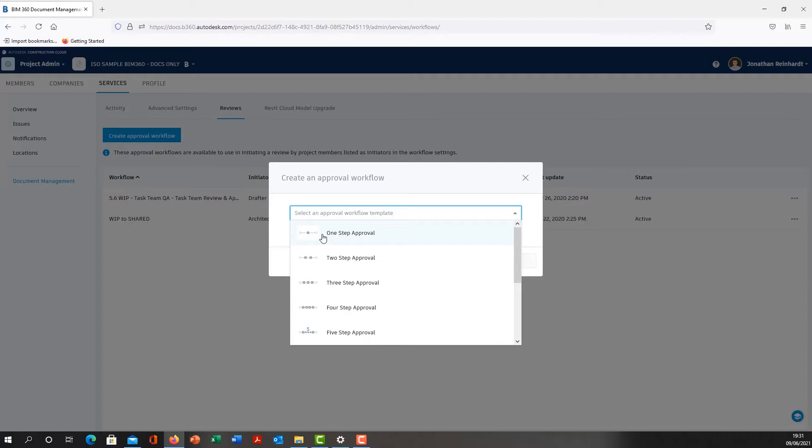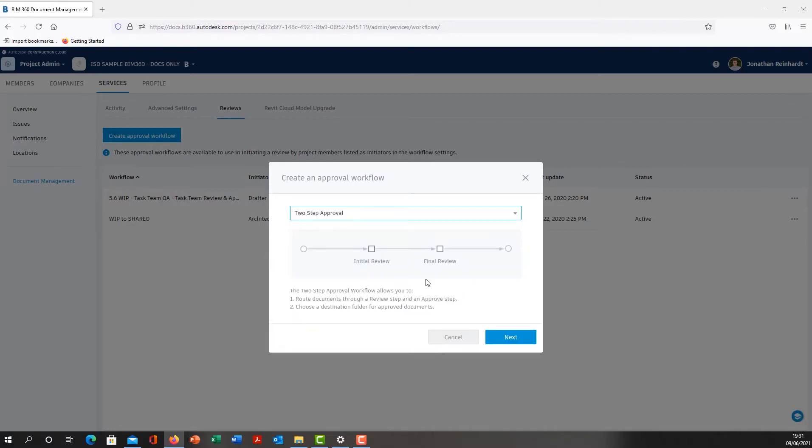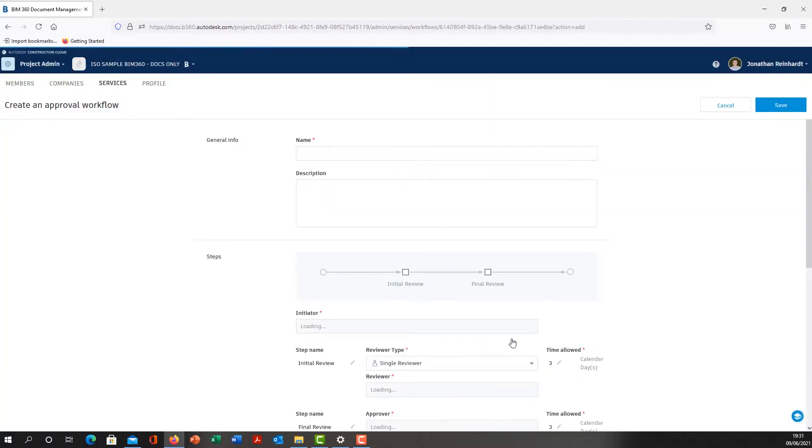We're going to choose two-step approval. It shows us here the concept diagram: starting point goes through an initial review, final review, and then we've got the final endpoint, which is the folder that it will actually arrive in.